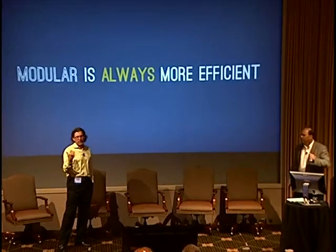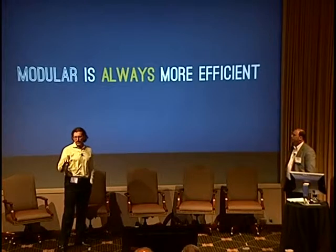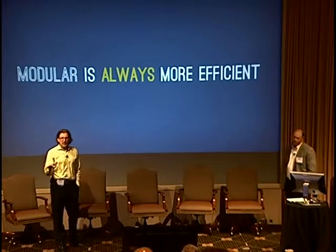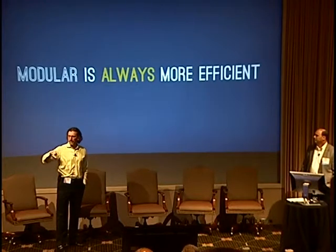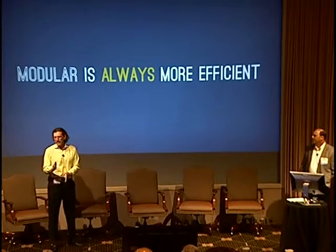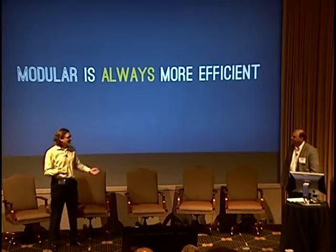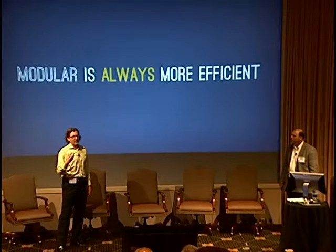Yeah, and we've seen it even with some of our builds. As we've done the prepackaged M&E pieces, there's a lot of details and a lot of things to define, and you've got to go through a progression, and they get better as you go. The first ones show up and you say, oh, I didn't really know you were going to route it this way, or that's too close to this, that, or the other. So you definitely have to have some good mentality around the production controls and how it's coming together.